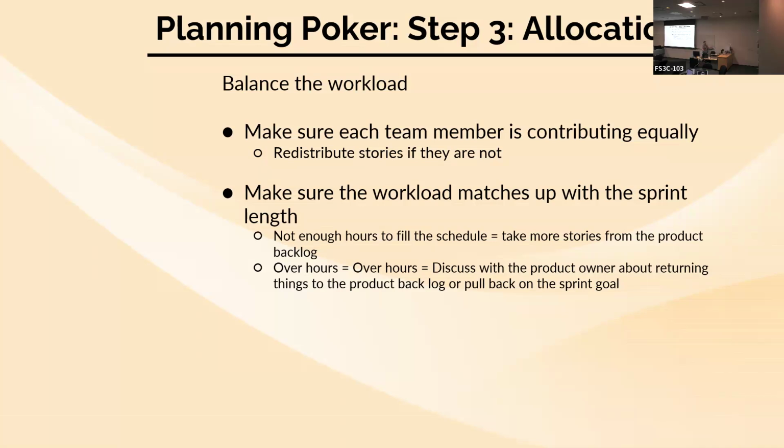It could also be the other side of the coin on this one as well, though, where you're done with your estimation, you're done with your sprint planning, and you can see that we know we can get 150 points of user stories done every sprint, and we're done with our sprint backlog estimations, and we're only at 120 points. Hey, let's look at the product backlog for any cool-to-have features, right? Let's just add other things to the game that will make your game better. I can start adding Easter eggs into my game, and I can add big head mode to the game, right? You can do all these other things that we didn't know we had budget for, because apparently we have the budget for it. We have it put in place, so we can make a better game from this.